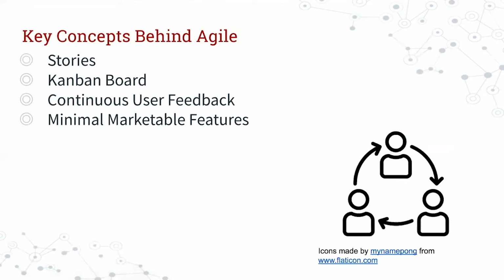As you're going forward through the process, you're going to end up taking these stories, and typically they're put on some sort of board. They move through that board, through things like a QA step, to do, and finished, and we'll go over it later when we talk about Kanban. That lets you see where things are, and what's still left. It helps you communicate later on to management where you are and where you need to go. So again, it creates clear communication, a clear ability to talk and show where things are going. That's why they're really important.